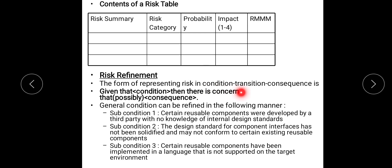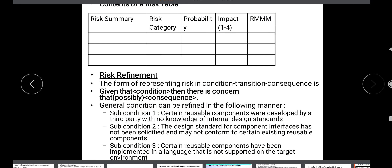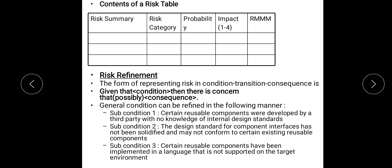taking the form of condition, transition, and consequence. It is expressed as: 'Given that some condition, there is a concern that a consequence would occur.' For example, sub-condition 1: certain reusable components were developed by a third party with no knowledge of the internal design standards. This example illustrates the condition as well as the consequence, and there are two other similar examples.